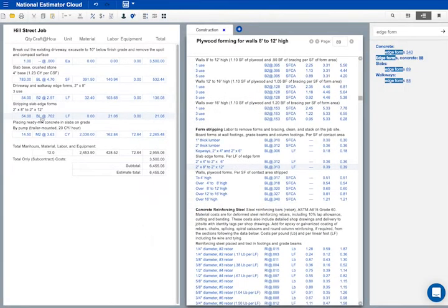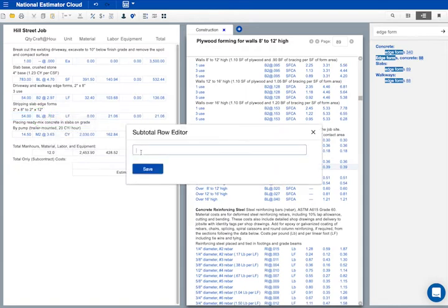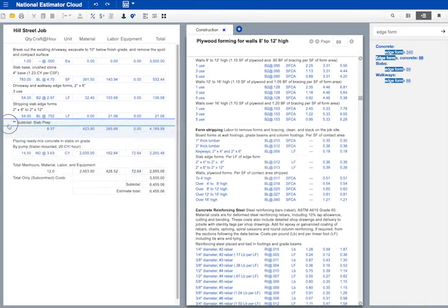I'm going to click here and right-click to put a subtotal in the estimate. Subtotals make estimates easier to check and understand, but that's not all. When this estimate is done, I'm going to turn it into a bid. When we get the job, I'll convert this estimate into an invoice. Estimates have to show every cost. Bids and invoices don't. It's enough to list charges by job phase. That's why I give each job phase a subtotal in my estimate. I'll show how this works a little later. Okay, we've got a subtotal in the Hill Street estimate.